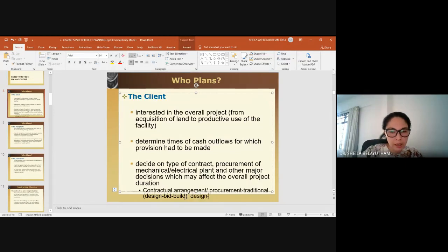And then you have design build, which is quite common also. Okay, so design build is whereby a client hire design build contractor. So meaning to say that the design build contractor can be one organization that contains design and also can do contracting, or it could be a joint venture between two companies, but they do the whole package too. They do the design and they do the building together. So design build project, you can actually conduct fast track project, because you are working together. You can design foundation, contractor builds foundation, and then at the same time the designer is doing the second floor column, beam design and so on. Okay, so design build could allow you to conduct a fast track. So that is basically contractual arrangement.